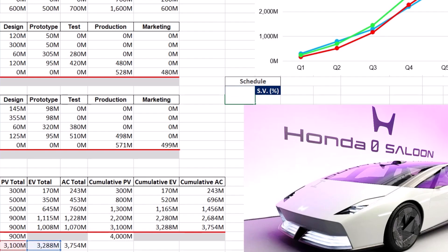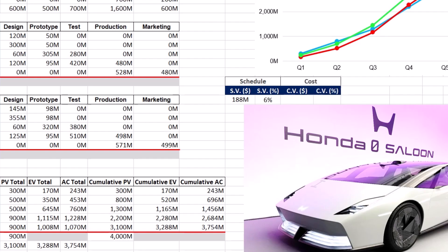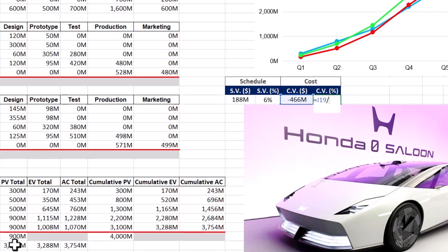The SV percentage is calculated by dividing the schedule variance in dollars by the total PV at the review or status date. For an objective measurement of financial performance, we need to find cost variance or CV in both dollars and percentages. CV shows how cost efficient the project is — it is the difference between the total earned value and actual cost at the review or status date. A negative CV indicates that the project is over budget and must prompt immediate corrective actions to mitigate cost overrun risks. The CV percentage is calculated by dividing cost variance in dollars by the total PV at the review or status date.